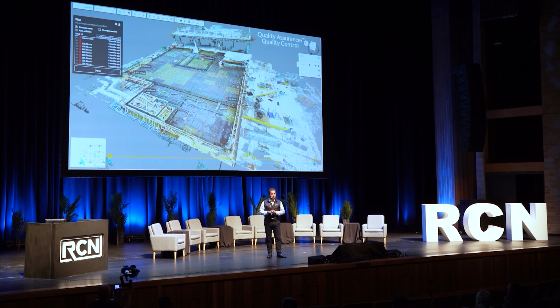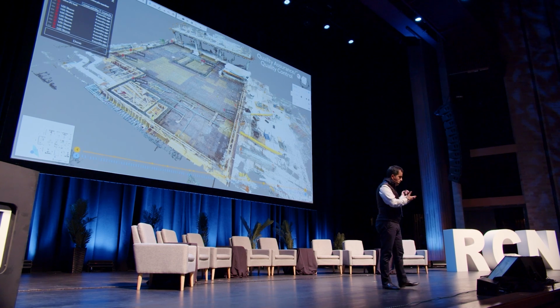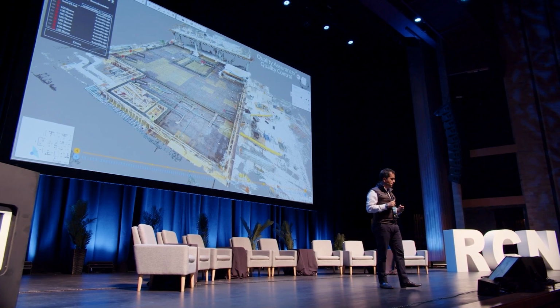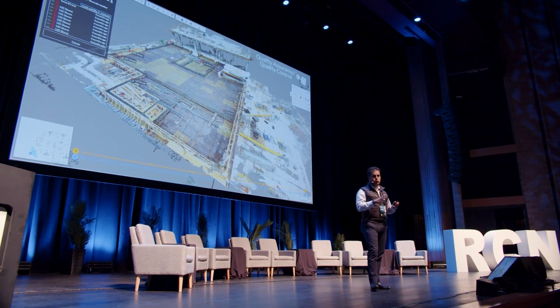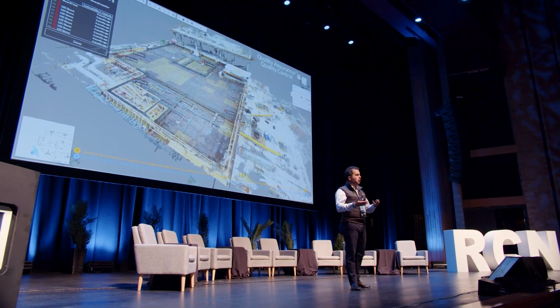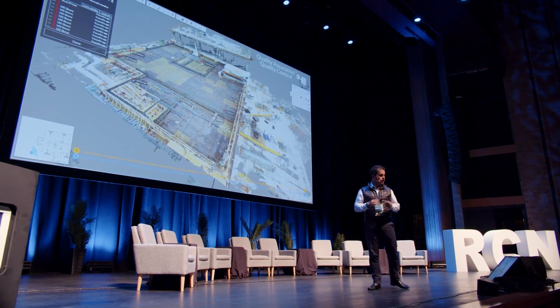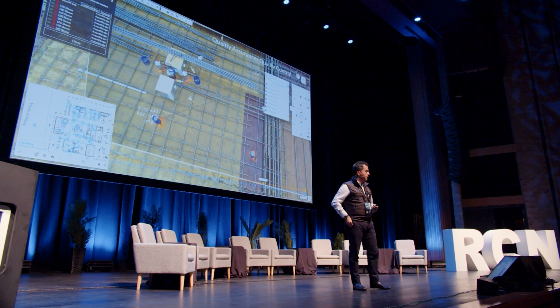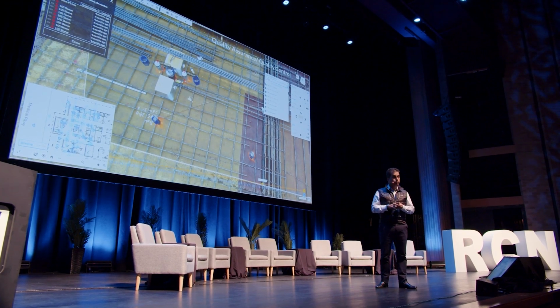Here's an example of pre-placement of concrete inspection, very common. We use a lot of laser scanning. I've seen that a lot. But in this case, this is a specific example. You're looking at a combination of drones and smartphone videos. Drones, because it's easy to fly over, you don't have to damage the integrity of the structure. But of course, if you have access to walk, you can simply use your smartphone and videotape that site. So here's a point cloud, and here's the overlay of the design. Again, this is the beauty of having it overlaid and measurable.